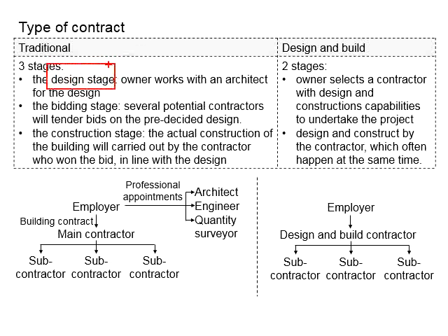At the design stage, the owner or the employer will work together with professionals such as the architects, engineers, and quantity surveyor to work out the design of the building or the infrastructures. The architect will take charge of the aesthetic part, engineers will take part in the structural part, and the quantity surveyor will do the quantity parts. At this stage, a sound viable design will have been confirmed, and the tender document will have been drafted.